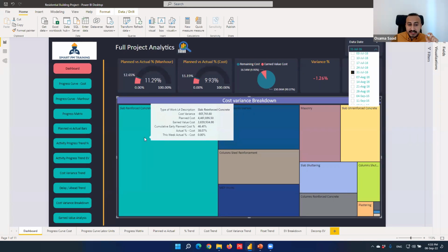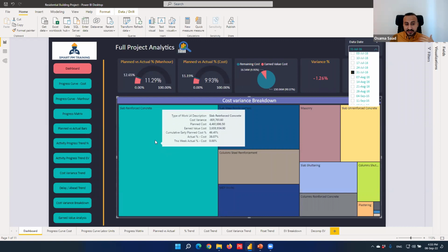Surprisingly, if you look at the additional information that you see in front of you right now, when I hover over the activity, the work accomplished over the past week only is zero. So that's really interesting, right? Because right now, this activity is not only the number one cause, but I'm not doing any progress there. So it makes sense that the delay is significant enough to promote it to number one cause, as a top cause.